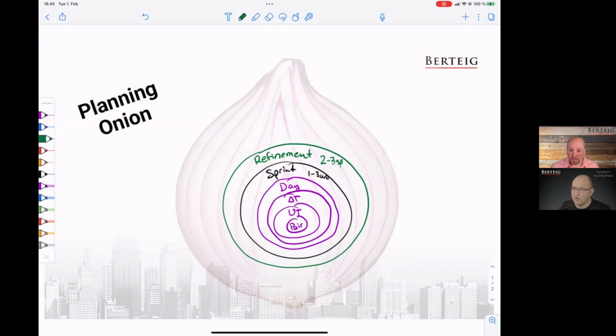And for what it's worth, a lot of people in agile environments talk about this in terms of getting backlog items to a ready state. That terminology might be familiar to some people. I'm going to write down that word later as I go through. How would I visualize these different layers? So the word ready is actually coming out. So yes, definitely. Anyway, so refinement is rolling wave planning. We keep the wave ahead of us and work on that.